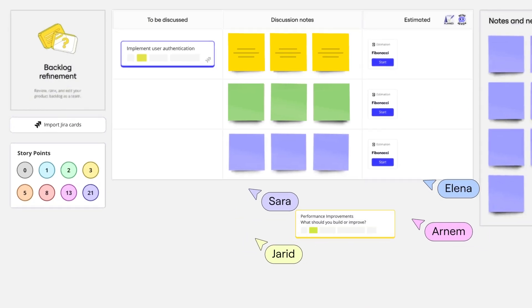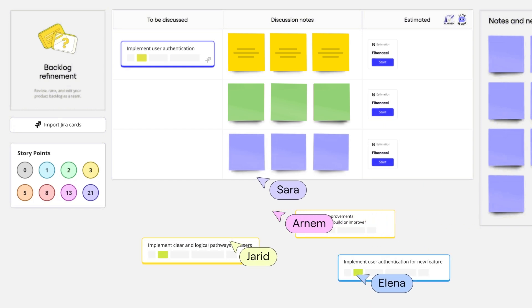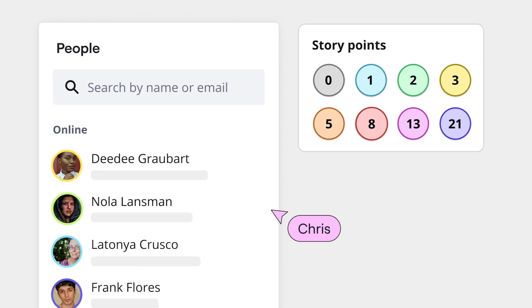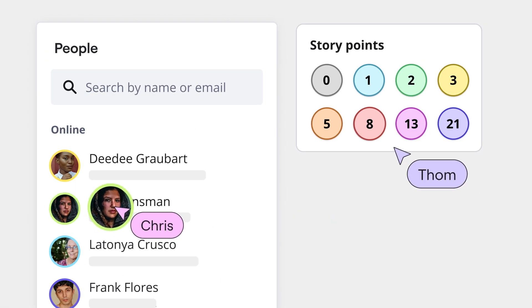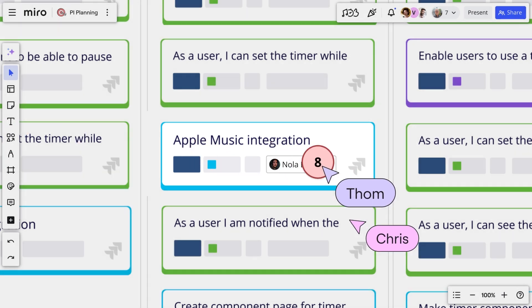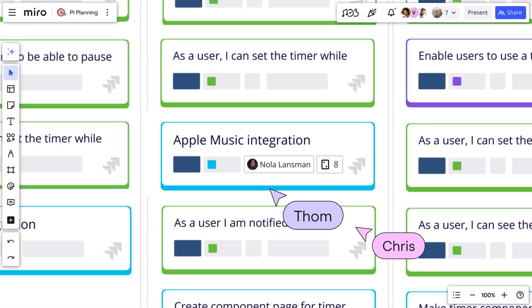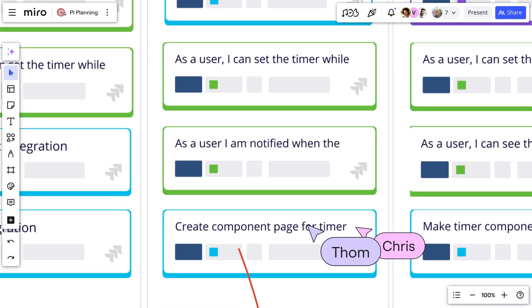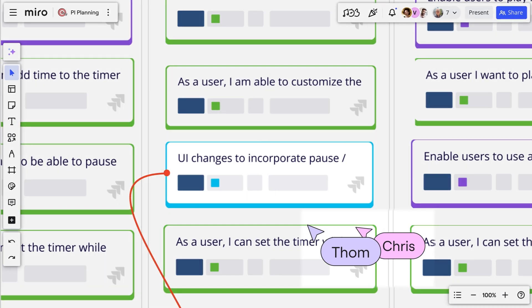We might then slice our milestones into even smaller chunks of work. We assign teams and individuals to different tasks, estimate how long the work will take, and flag potential risks and dependencies across teams. This gives us a more granular plan for a single cycle of work.